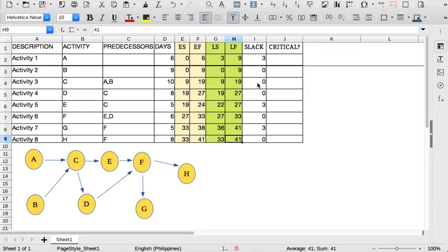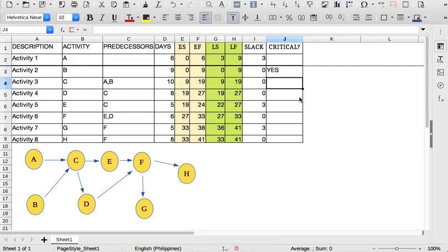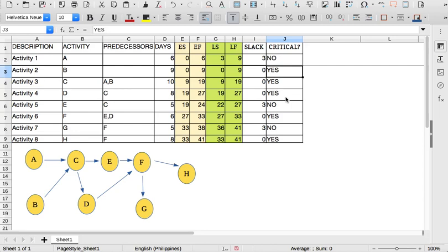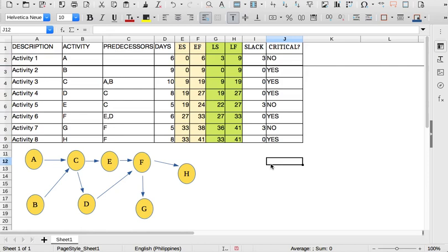So what are the critical paths? For task B, if the slack is 0, it needs to be finished on time or else the project completion days will increase. Those which have no slack are critical, and those which have slack are not critical. The critical path consists of those activities with slack equal to 0, which are B, C, D, F, and H. So the critical path is B → C → D → F → H. That is how you solve the critical path method.